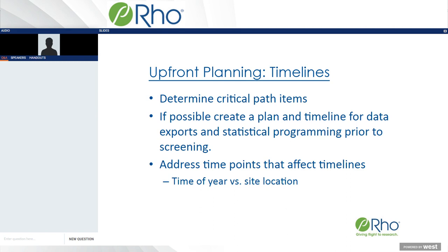How long does it take to build your EDC system? Your central lab vendor, what is their turnaround time for contracts? All of these things are your critical path that will let you know what is reasonable for your first patient, first visit.